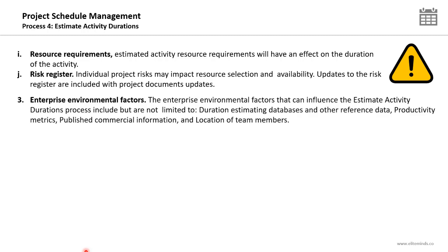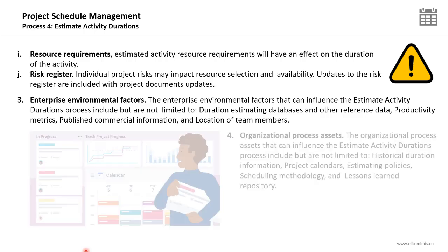The third input will be the enterprise environmental factors, and some of these factors that might influence this process include the duration estimating databases and other reference data, productivity matrix, published commercial information, location of team members.